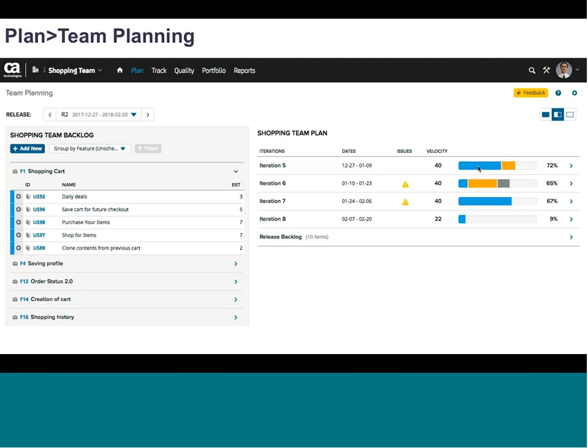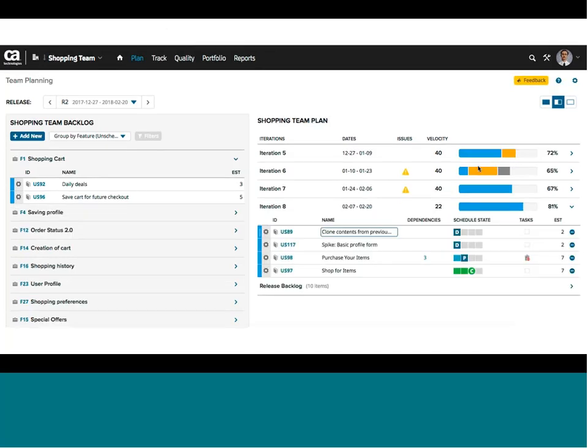So it becomes important at that point to actually be tracking data across those 4 iterations. It's good. We want to look at our 2-week sprints. We want to know how we're doing. We want to know if the work is burning down. But just as important, we want to know how we do as a team across this 8-week period, this 8-week time box, this broader release. And we've got some good tools for this.